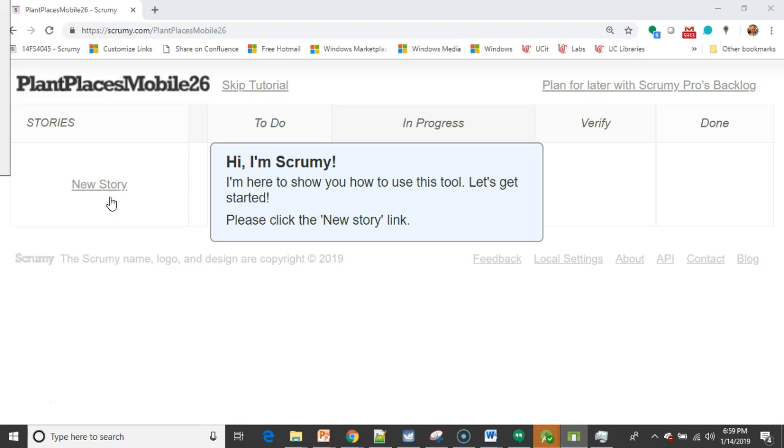One thing that we do in Scrum and Agile is we know that stories are always going to be evolving. So in other words, we're not working with a fixed scope. We know that we're going to have more stories that get added as our capabilities change, as our competitive environment changes, and maybe some stories that aren't providing any value anymore that we're going to take off the list. So the stories on the left, this is essentially our product backlog or the list of features that we wish to work on. Now, where do the features come from?